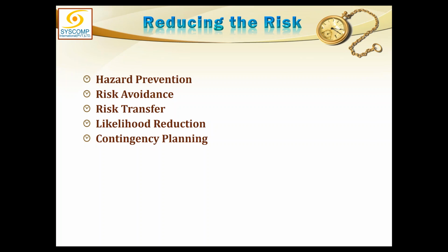Both ways the damage will be decreased, because the likelihood and the amount at stake are multiplied to find the impact.